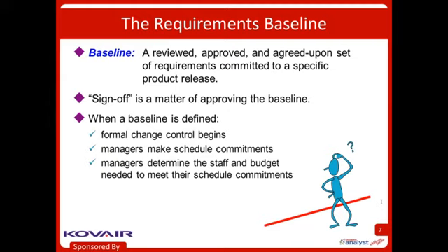Nobody likes that. Everybody wants change to be free, and the sad fact is change is never free. You have to make sure all of your partners and stakeholders understand that. Even the act of talking about a change and then deciding not to do it takes time. It costs something. Change is never free. That doesn't mean you can't do it or shouldn't do it. Often there's huge value in making changes. But just understand there are some implications. There are some costs.